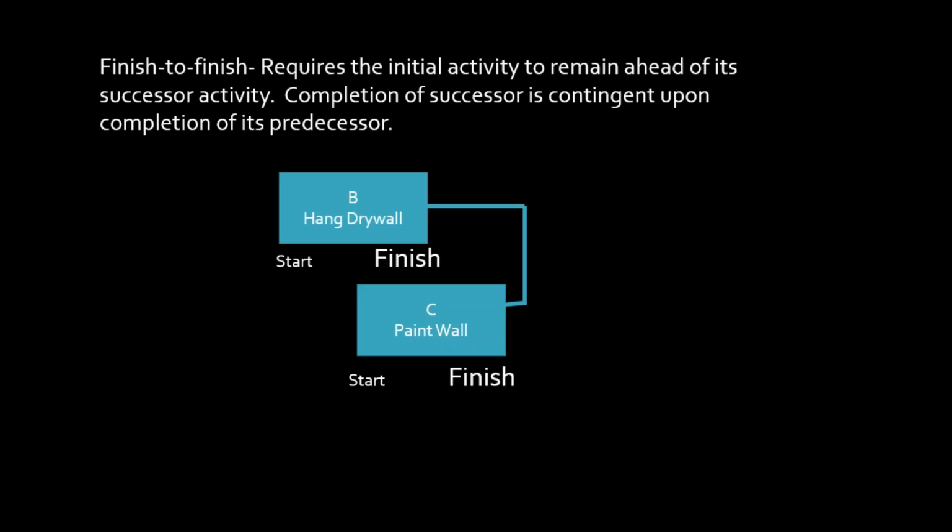What kind of control is this, Clark? Let's say I'm on a construction crew. I have a drywall crew and I have a painting crew. They're not necessarily the same guys, are they? They could be two different companies. I don't want the painting guys to leave until all the drywall is hung. So if the drywall guys have some kind of delay or had to wait for another shipment, task C is not done until task B is done. Your painters cannot pack up your truck and leave. You're not going anywhere. I put this in as a control, but there are other uses for it.